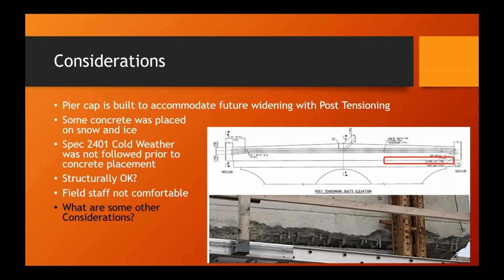Okay, we have one person say remove and replace. Good point. Interesting dynamic between MnDOT, prime, and sub. And on that note, why is MnDOT dealing with the sub? MnDOT should be dealing with the prime. They have their contract with the prime, not the subcontractor. A lot of remove and replace.